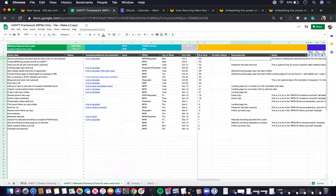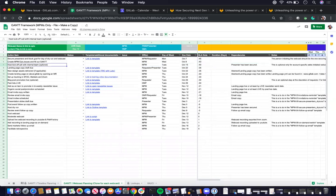There's also column J, which is column for dependencies. So it's to outline that, for example, in order to host a kickoff call, you need to make sure the presenter has been secured.